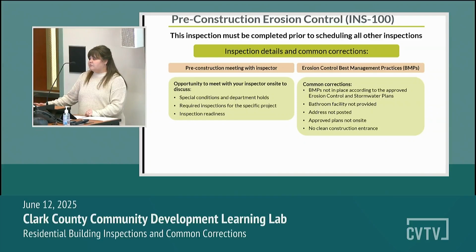Really, the main goal of this inspection is to treat it as a pre-construction meeting with your inspector on site. It gives you an opportunity to discuss any of the special conditions or departmental holds that may be affiliated with your project. It's a great idea to get an idea of all those requirements at the beginning of your project so you don't get all the way to final inspection and realize you have a bunch of other stuff that needs to get taken care of.